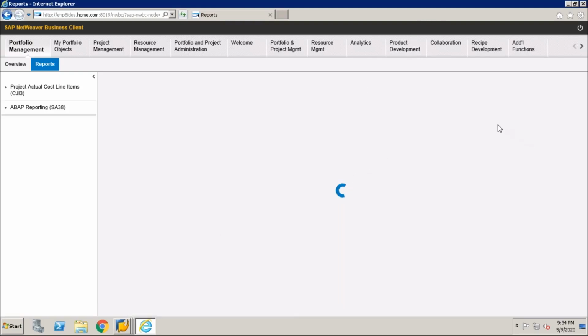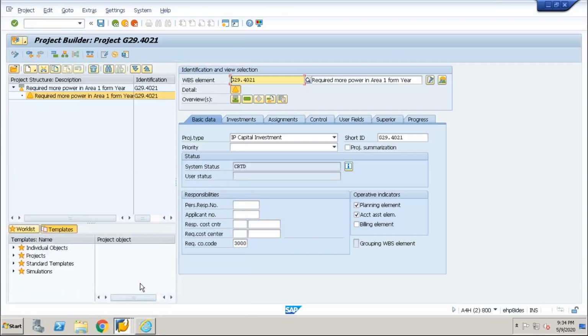One question, please. You transfer the planning values to the WBS, but we need to approve the budget. How is the approval of the budget done? Here only planning values have been transferred, not budget. But investment management controls the budget, so yes, it's a top-down distribution. How is it done? In the next session, I will let you know how you can roll up the plan values to the IM program, and then how you can distribute the budget directly. I'll explain it.